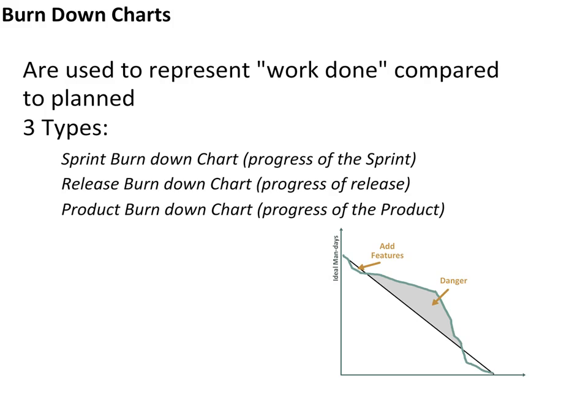So when you start the sprint, you have a certain estimated story point that needs to be delivered by the end of the sprint. So you start at the peak of it, and as the sprint progresses, you bring it down to zero remaining story points. Now, the ideal representation of this is shown through a straight line, but in reality it's rarely that way.